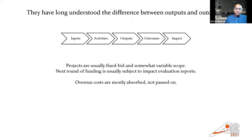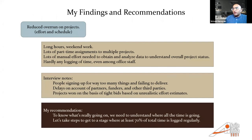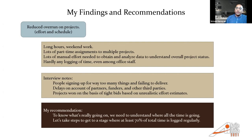With this context I started talking to people in that organization and understanding their situation. There was a whole variety of projects. I found consistently that a lot of people were saying they were already working long hours, working weekends voluntarily — this was not a deadline-driven thing where people were asked to work long hours. Also, there were too many part-time assignments — most key people were working on five or six different projects, potentially allocated 30% of time to each, so effectively 150% allocated.